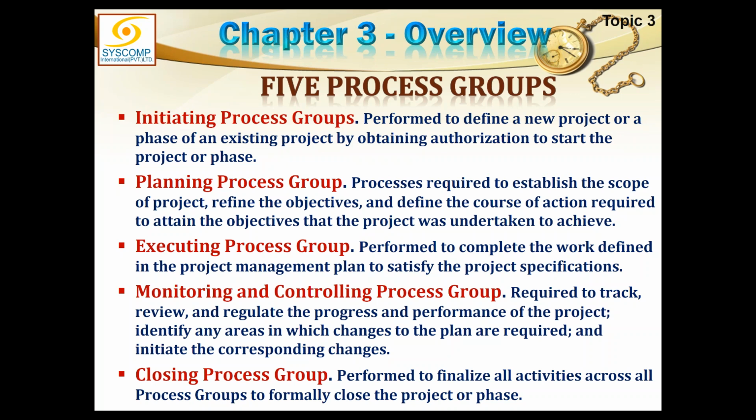Is there anything to be changed? If execution feels there is something to be changed, execution can submit its request to monitoring and control. It is called a change request. But by itself, execution has absolutely no right to change anything on its own.